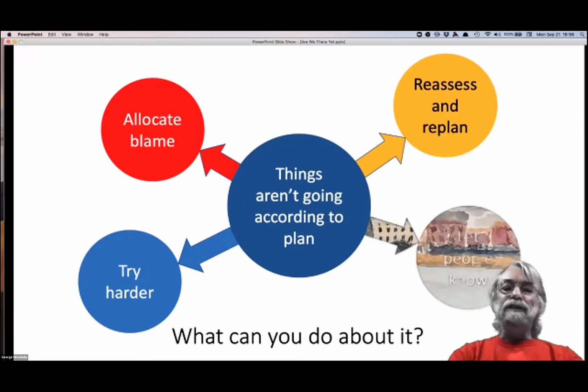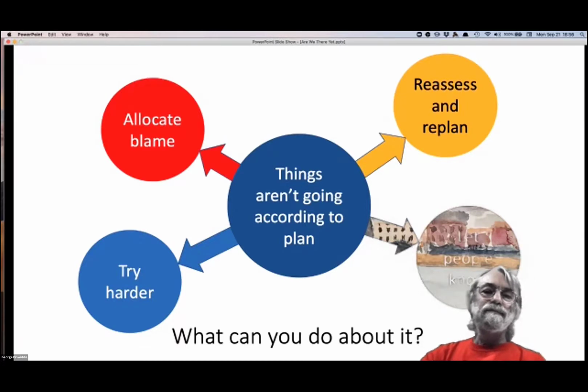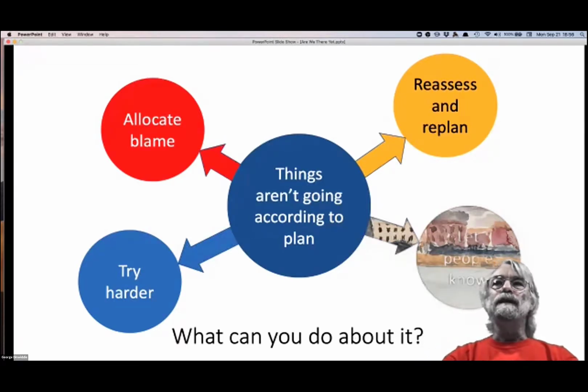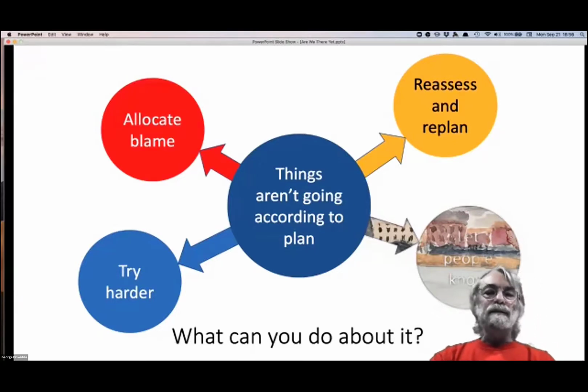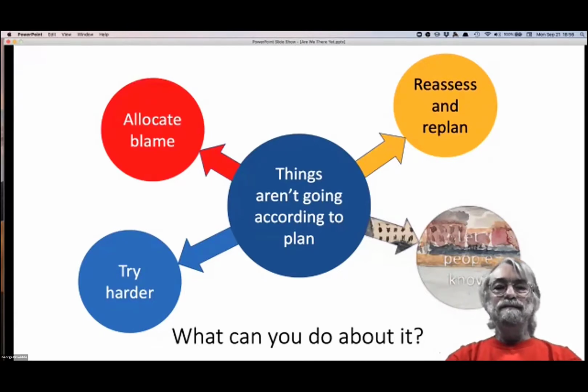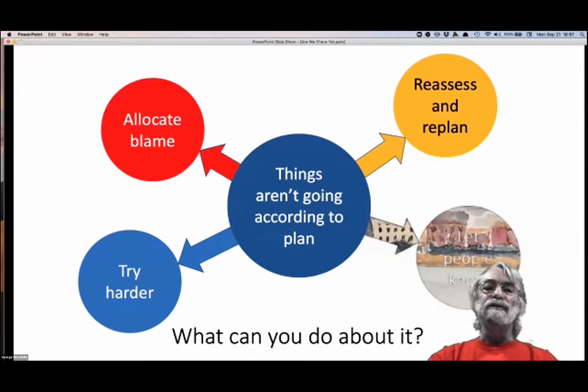But sometimes it affects the overall time, the overall rate at which you're traveling, and you don't have enough contingency for that. And so one of the important things about figuring out early that your plans aren't working is so that you can let people know early. You don't want to wait till 2 weeks before a software deployment to say, oh, it's going to take us another 6 months. That tends to not be a happy situation.